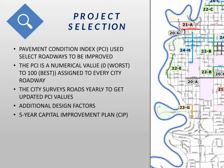You may be wondering how and why your street was chosen for improvements. There are several factors taken into consideration. One significant factor is what we call a pavement condition index, or PCI, which allows us to create a score as a representation of the condition of a certain road. The PCI is a numerical value with 0 being the worst and 100 being the best — 0 meaning no pavement left and 100 meaning essentially brand new construction. Every street within the city gets one of these values and we update them annually. The city hires a consultant to evaluate the condition of the road and we feed that information into our pavement management software, which helps us determine which projects to do based on our budget for the year.